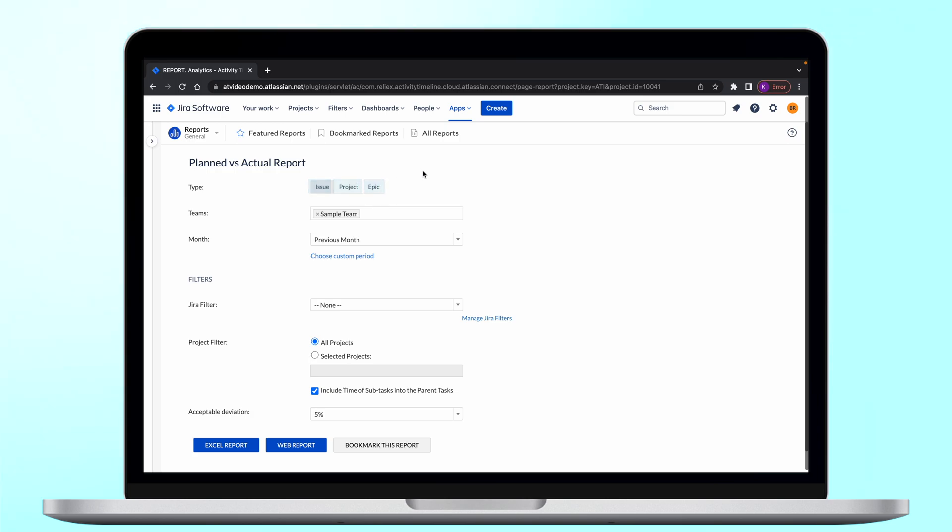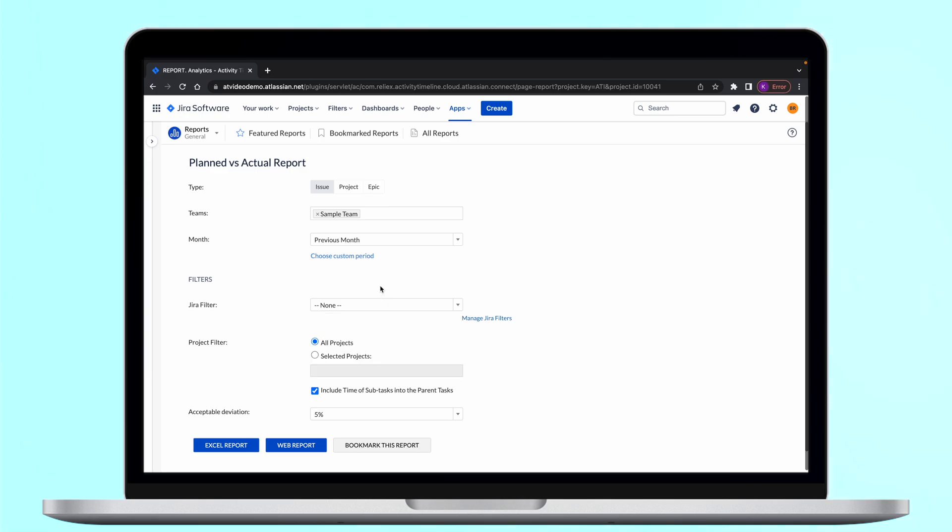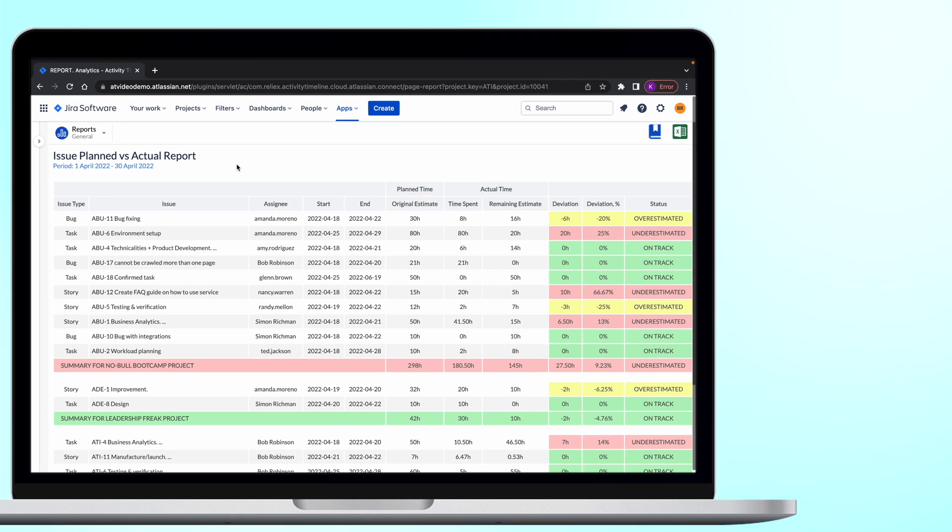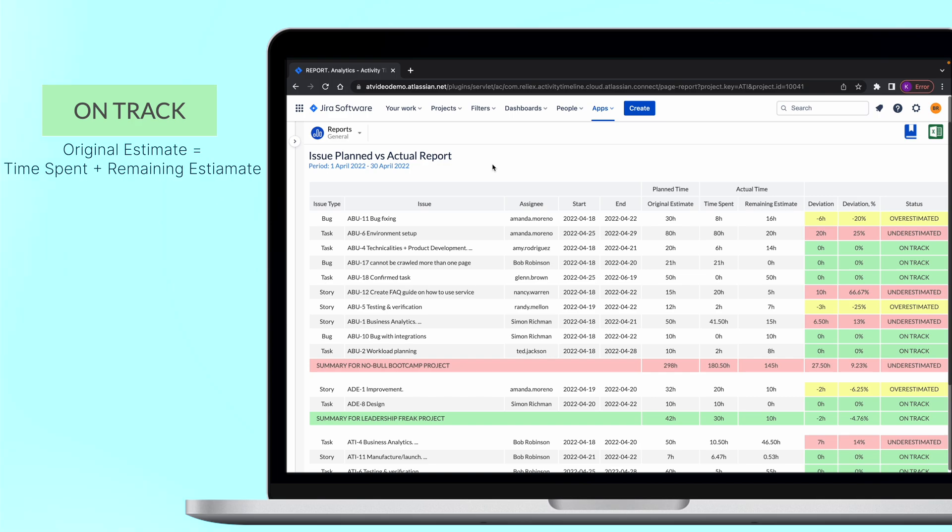You can also create a report either from the entire project or a subset of tickets using Jira filters. The main idea behind this report is to compare the planned time against the actual which consists of time spent and time remaining. Ideally the original estimate should be equal to the time spent plus remaining estimate. In this case the task is on track.